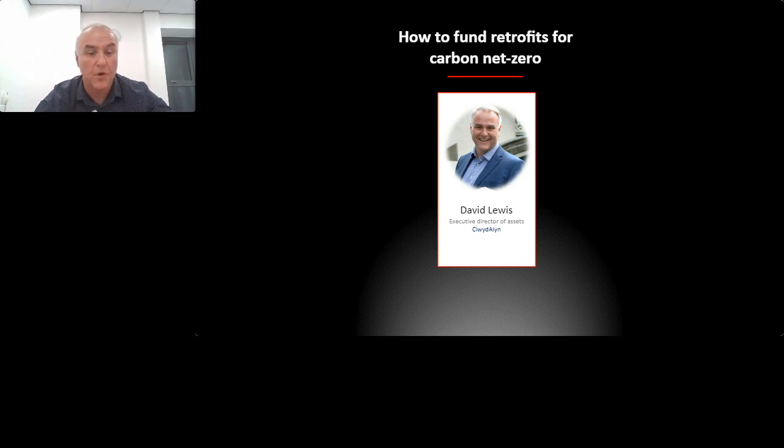Well, firstly, we need to understand how the home is being used and what the occupants are doing, and where their largest energy use is. We will gather the information using recognised partners such as Warm Wales, who will conduct a Healthy Homes and Healthy People survey for us to understand residents' circumstances. This will help us to understand data, which is really important for our decision making. We'll also be trialling integrated energy systems, an IES. These will be connected to the utility supplies and will provide us with much needed information on what no-regret measures could be implemented to each home.